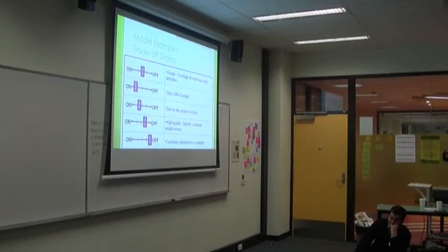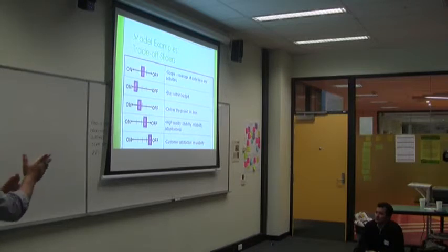Okay, trade-off sliders. There's a lean concept called measure up, which is that I ultimately want to have one measure of success that defines whether I get hired or fired. And even here we've got 5 measures, and that's 4 too many according to Lean principles, because what you really want is one. But what we say with trade-off sliders is, usually you do your classic project drivers of scope, time, budget, and quality. And you might have additional things such as user experience based on the project.